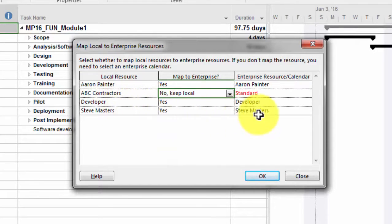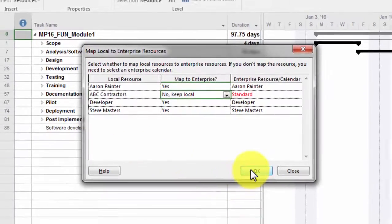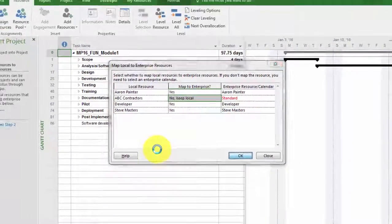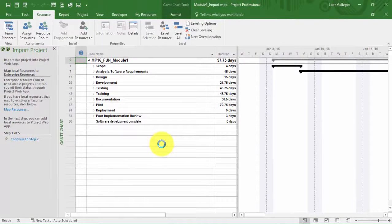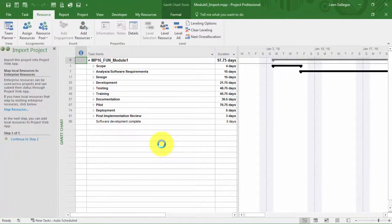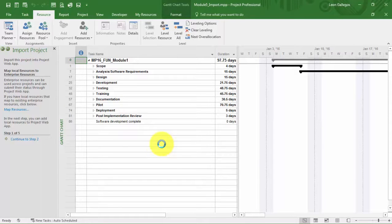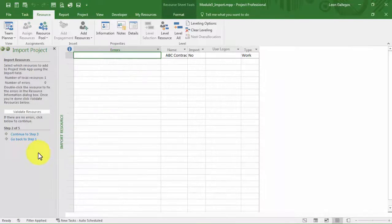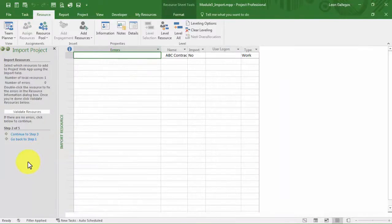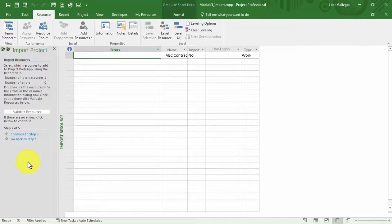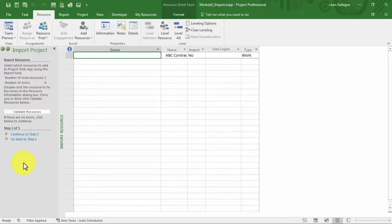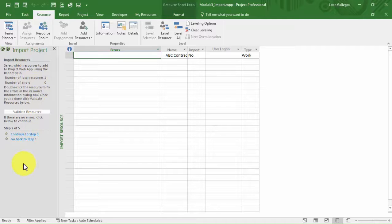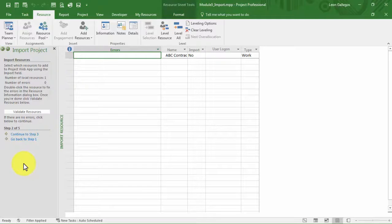You'll notice Developer as well as Steve Masters matches up perfectly. I'll click OK. That step basically went out and grabbed those enterprise resources and replaced them with your local resources, all from within that one screen. Then I'll continue to step two, and this step is basically just verifying what you've done. In fact, it's saying you've brought in these resources, there are no errors, but it's also indicating that a local resource was created. This is an opportunity for you to fix errors, and that's why we like to use the wizard, because before you actually attempt to save it to PWA, you get the chance to fix these potential issues.